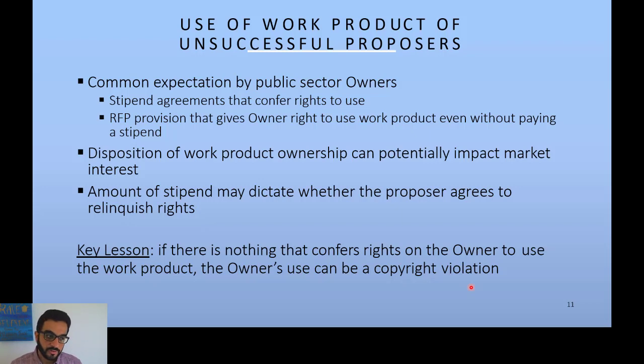The stipend that you offer has to be enough for them to see the value of, yeah, I can give the right for using my products by my competitors. So the key lesson here: if there is nothing that clearly states the transfer of the copyright from the design builder to the owner, and the owner decides to use the material or the product of these proposers, they're actually in violation of the copyright law.